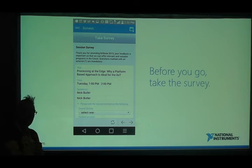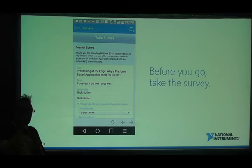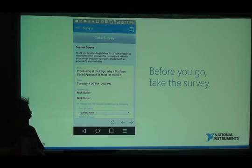So we go as far as defining the hierarchy of where stuff goes and things like that. Then when you have a code review or a project design review, we do a post-mortem, a code review and a design review. Project post-mortem has really changed the way we work. We don't ever let customers see it. We've got a separate repository for post-mortems, because they're a bit brutal.